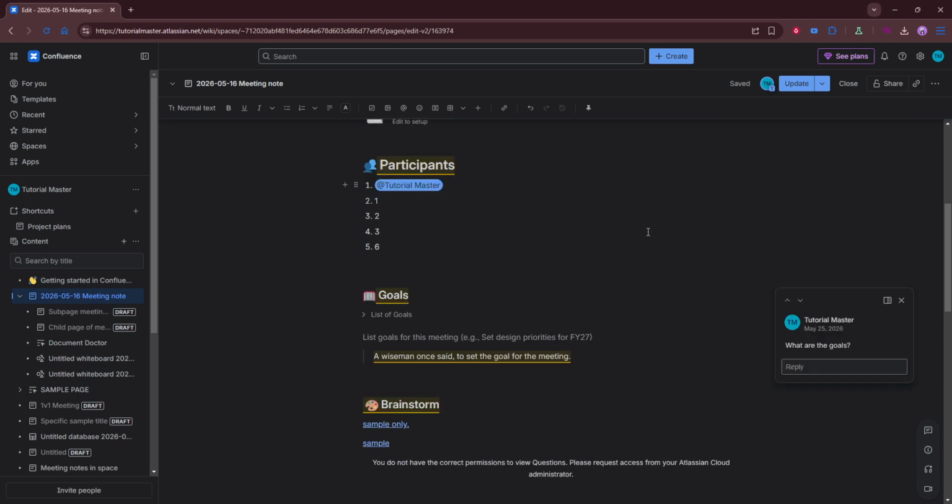If something looks off, try viewing the page as a typical reader or in a private browser window to simulate a viewer without elevated permissions. If the roadmap doesn't load, check Jira access, confirm the link type, or try the macro approach instead of a plain link. With that, your advanced roadmap is now live in Confluence and ready for your team to explore.